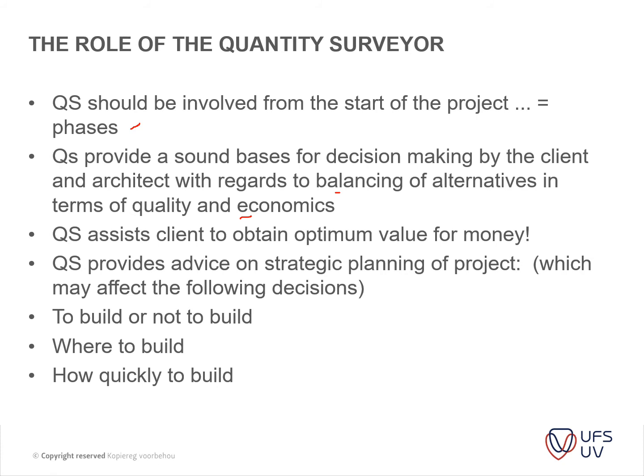So the alternative that we could get was normal formed glass with butt joints that could be installed on the project, which lowered the cost considerably, because the curved glass plant in South Africa closed down a couple of years ago. So all of those curved glass installations would have had to be imported. So those are the things that you would look at in the early stages.